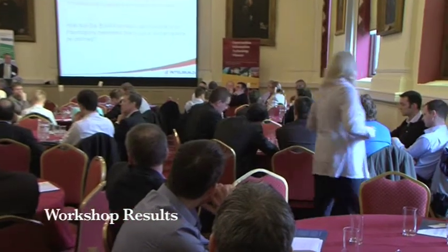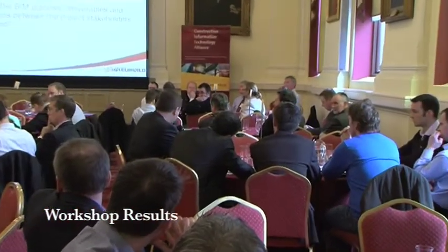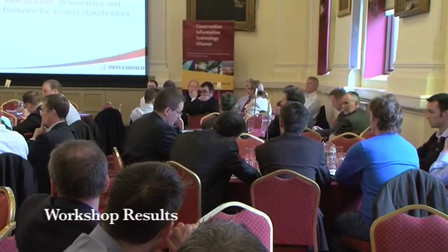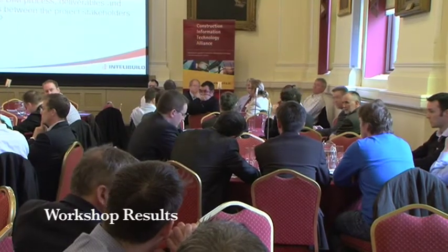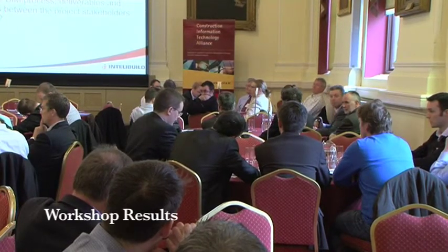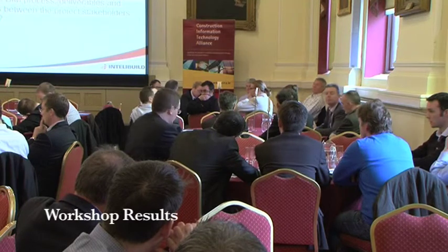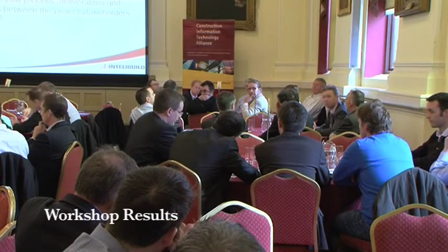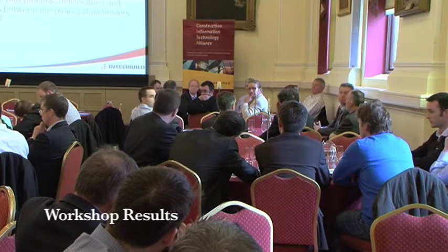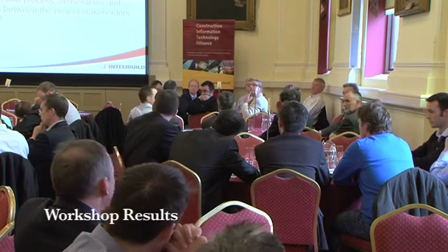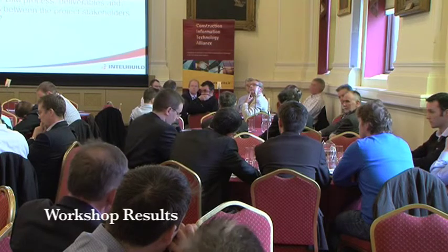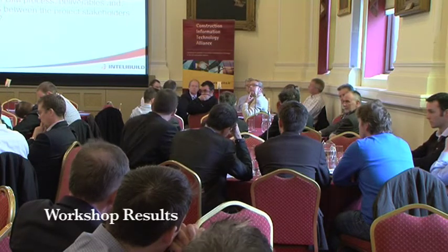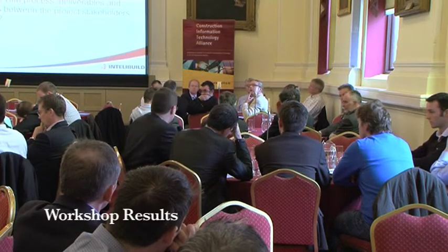Hi. We agree that the BIM execution plan is essential. We came up with two options, maybe, of who specifies BIM and who specifies the process. The client can specify the deliverable, and if that deliverable is in a certain platform in a certain way, he can affect the BIM process.